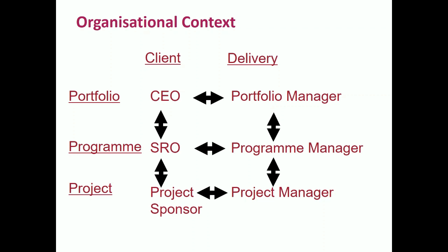Let me go back to the Olympic Park example again. One of the strategic objectives we had on the Olympic Park was a 96% reuse of materials found on site, a huge demand for sustainability. One of the strategic decisions made by the program was that there would be no ready-mix concrete trucks on site at all.